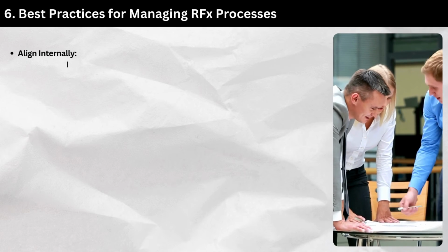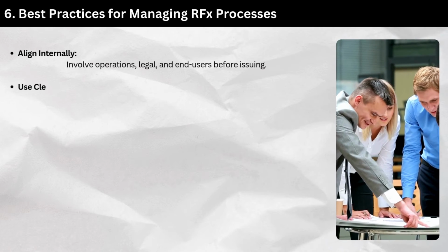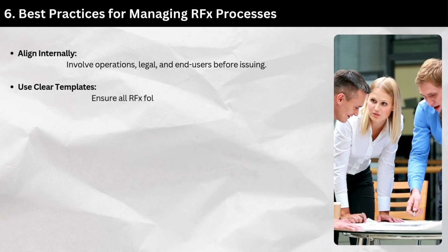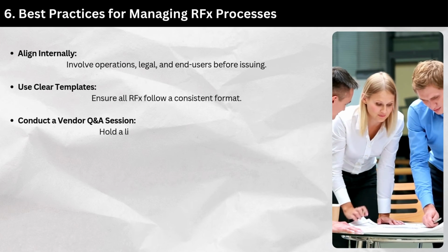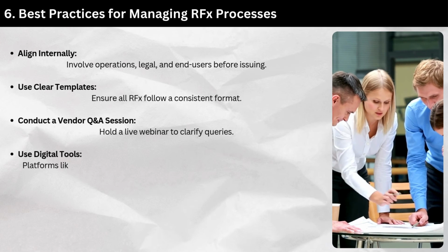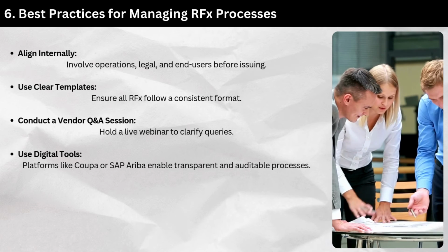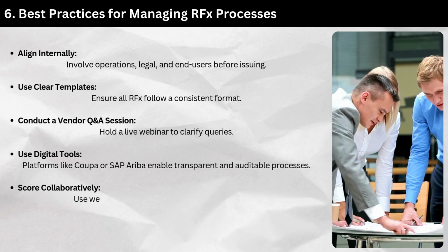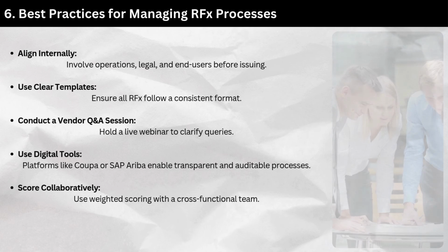6. Best practices for managing RFX processes. Align internally: involve operations, legal, and end users before issuing. Use clear templates: ensure all RFX follow a consistent format. Conduct a vendor Q&A session. Hold a live webinar to clarify queries. Use digital tools: platforms like Coupa or SAP Ariba enable transparent and auditable processes. Score collaboratively: use weighted scoring with a cross-functional team.